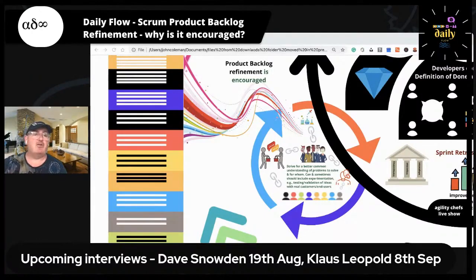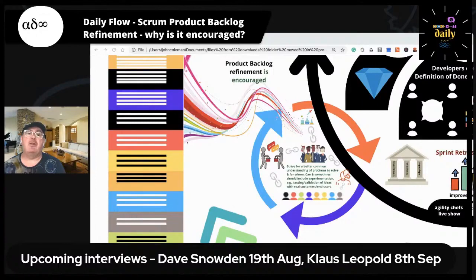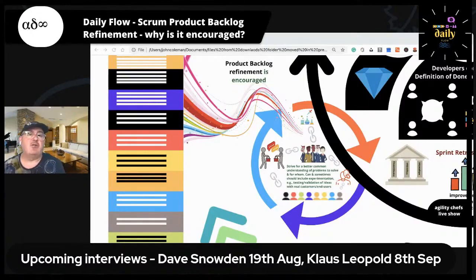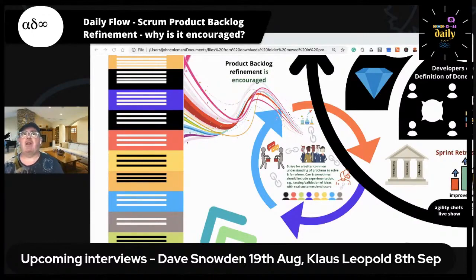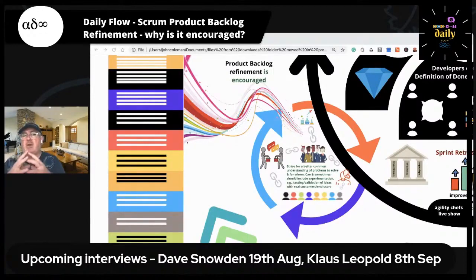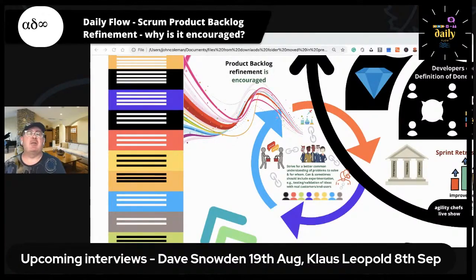Product backlog refinement is crucial. Even though two of the best teams I ever had didn't do it, they spent a lot of time in sprint planning really understanding what problems they were trying to solve and what opportunities they were trying to avail of. They also met stakeholders in the sprint review to understand what was going on commercially and strategically. But a lot of teams don't have the discipline to do that. There's a risk with leaving it to sprint planning — you could use the full eight-hour time box for a one-month sprint and still not have got through all the details, arriving with something elephant-sized.